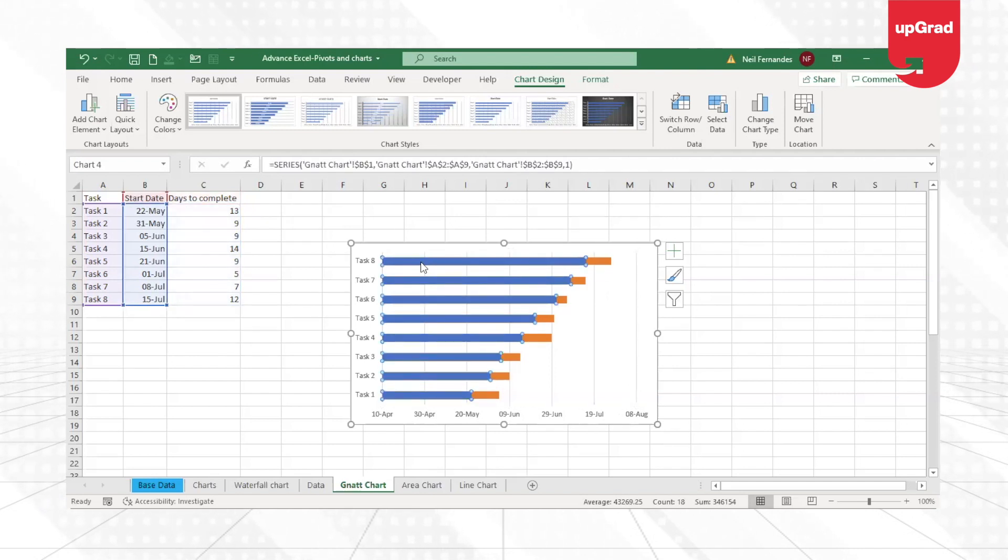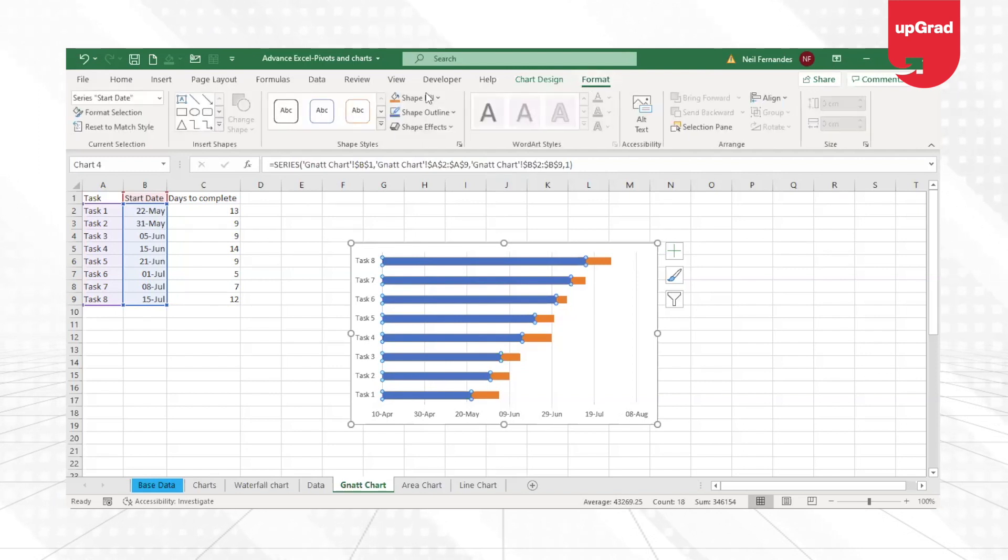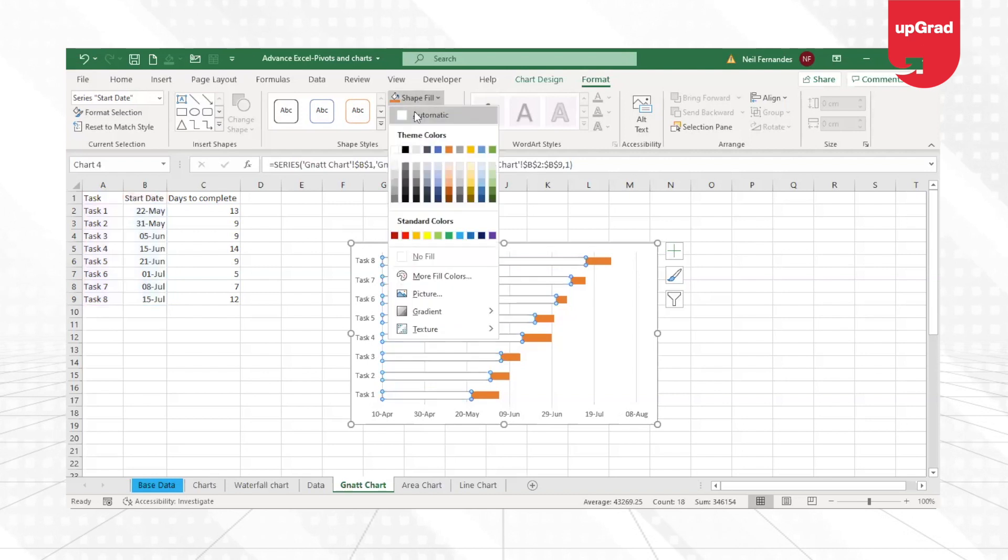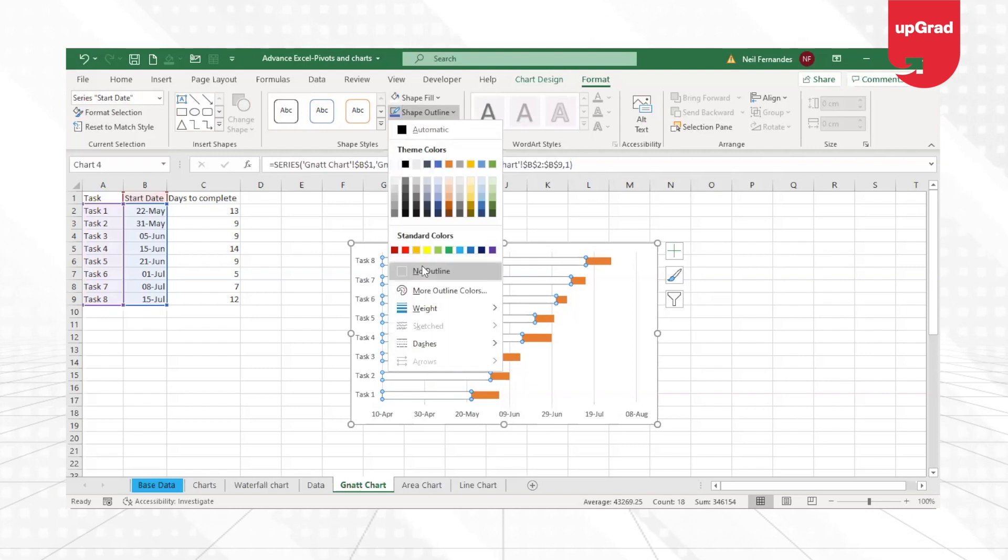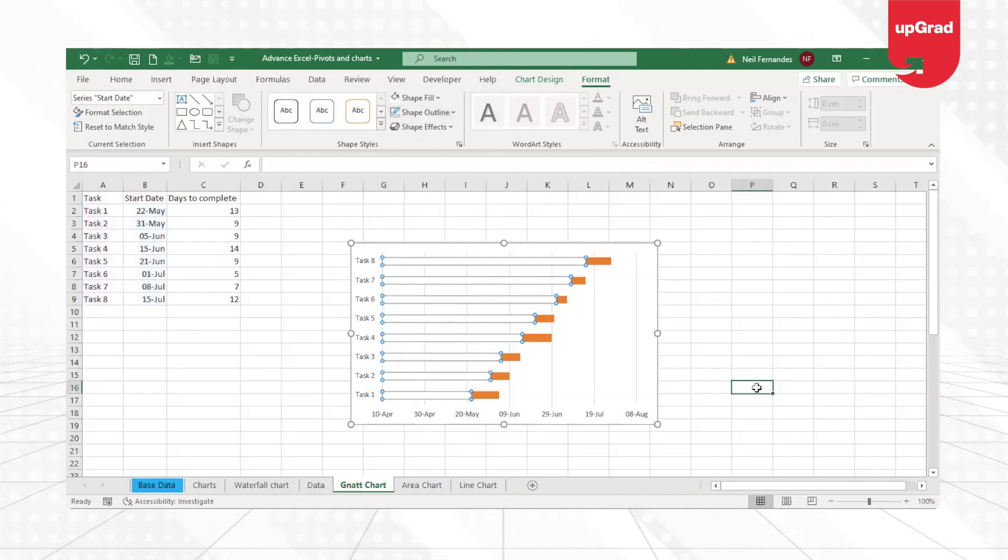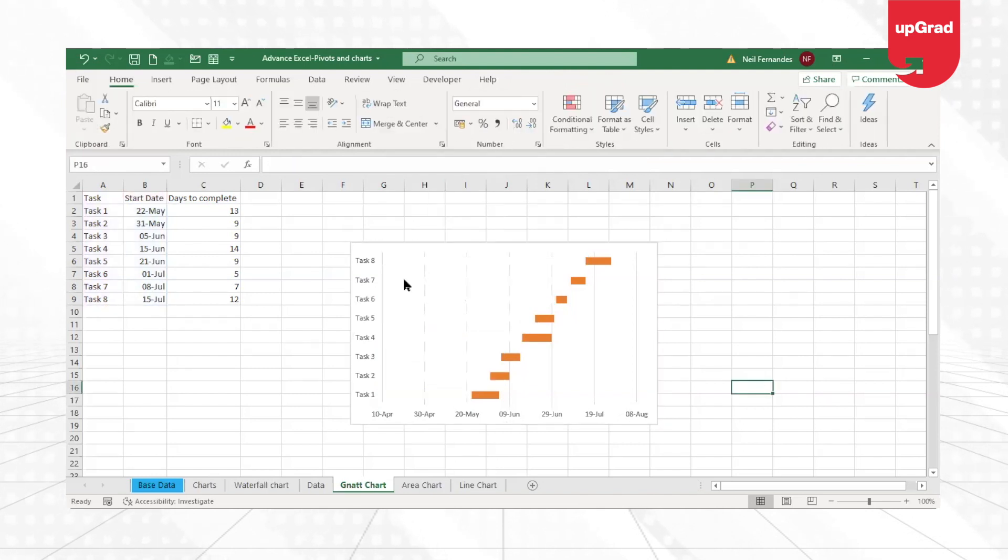Go to the Format from the ribbon and from the Shape Fill, I will just remove the color completely. Even the shape outline that I have, I will remove that and say No Outline so that there is no borders and it is not being seen at all.